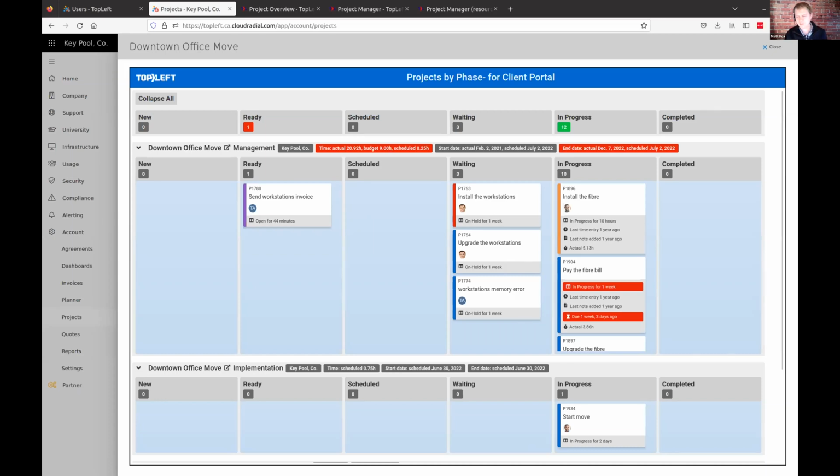It's just a lot easier to understand this data in the way that it's presented in this card format, rather than being a big table or a report that you need to look at really carefully. It does things like highlight certain problems for you, where, for example, this one with the red tag here is highlighted because that ticket has been in that column for a week. We don't like to see tickets that just sit around in the in progress column for too long, so it's flagging that in red for us.